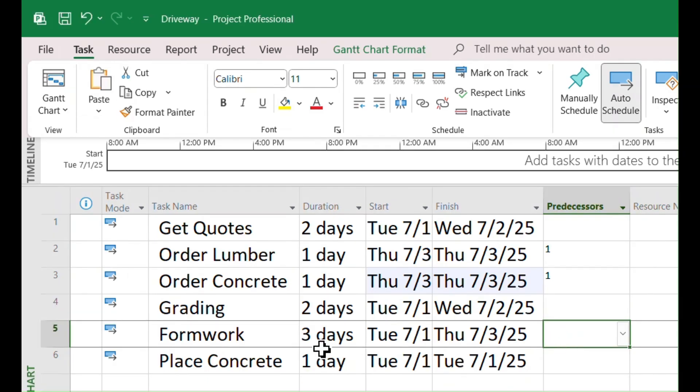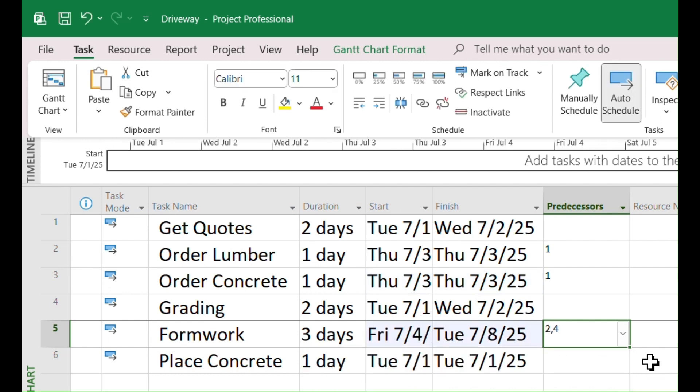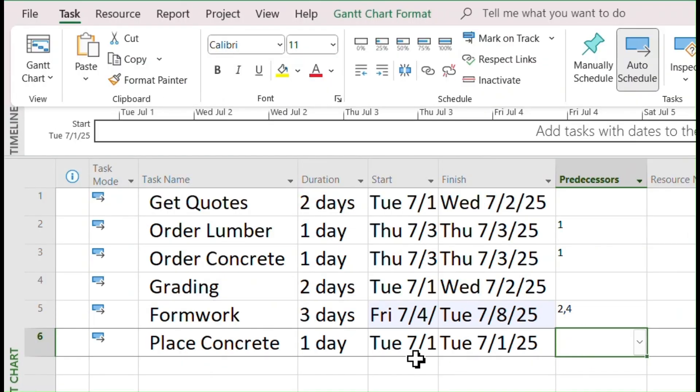For Formwork Task, Grading and Order Lumber need to be complete first. You can use the drop-down box to pick both tasks.